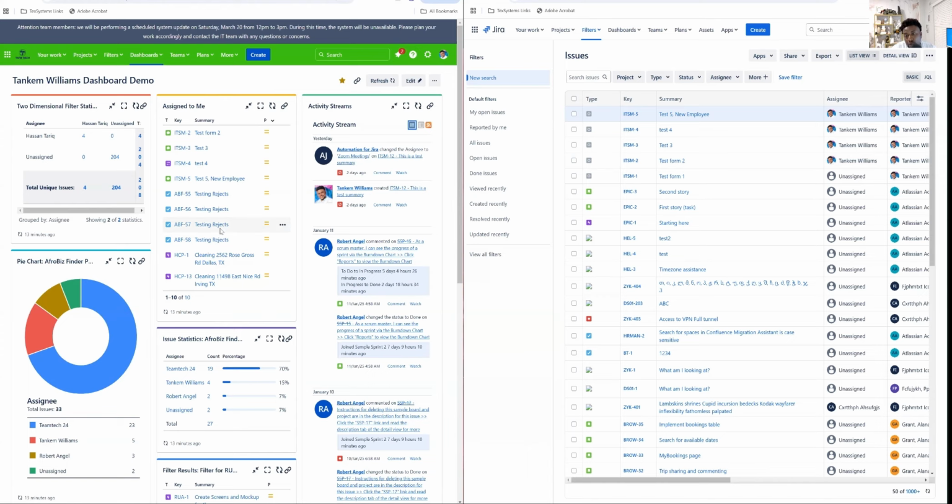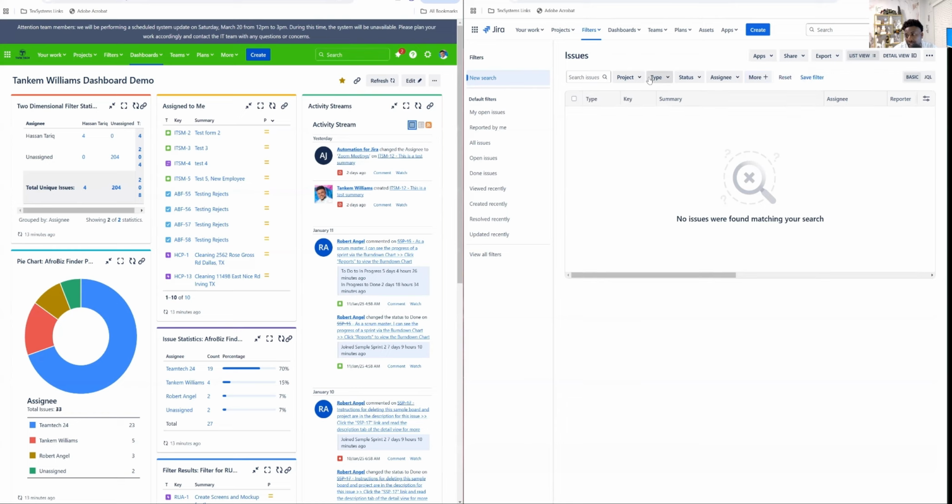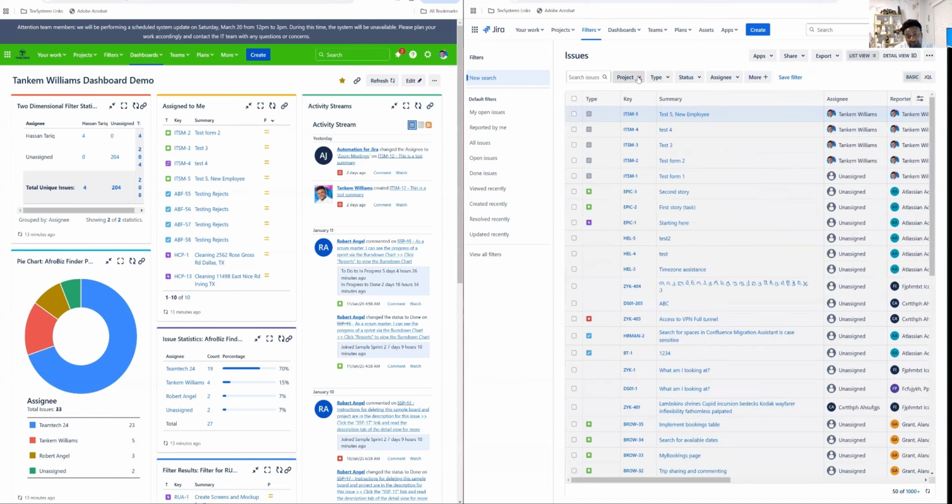Basically, when you want to export issues from a Jira site, let's do that by going into filters. Let's filter for those issues that we want to export. This might be random issues, or issues in a specific sprint, or issues from a specific project, or we can define exactly which issues we're trying to export. But in our case, I just want to export issues from a specific project. I'll choose the Adam C project.